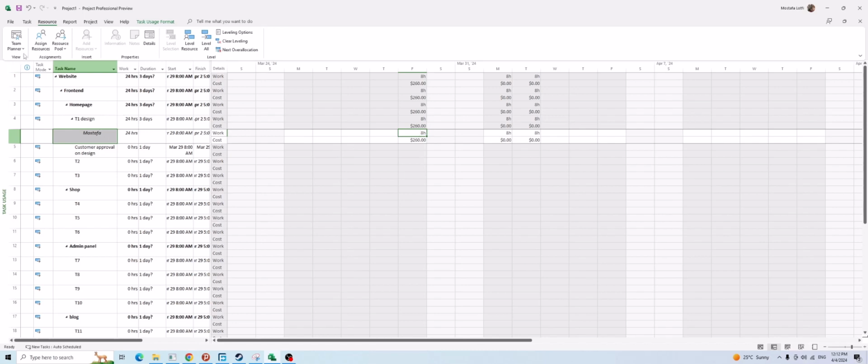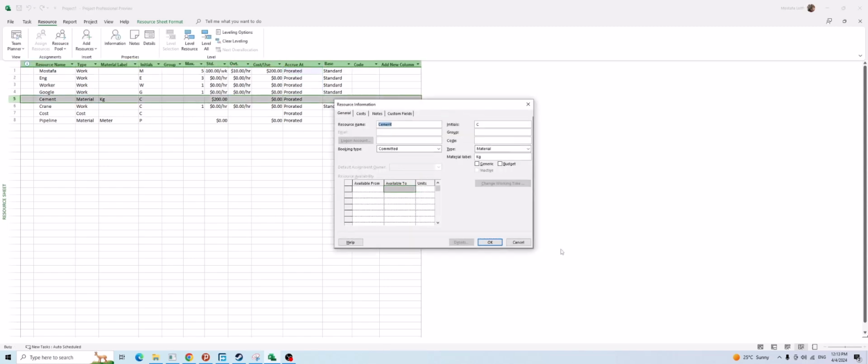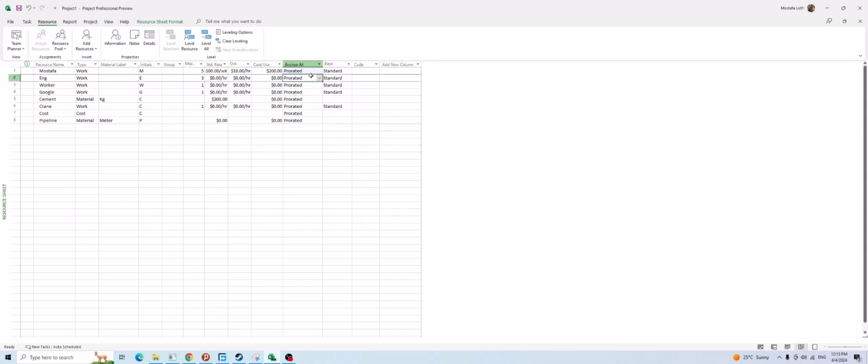It is very important when you want to have cost planning and when you discuss the budgeting of the project, because it is telling you at what time how much money you need. We will discuss more about this point during the budgeting, and you will see how important it is. But for now, by default, inside of Microsoft Project, the value is prorated, and if you need, you can change it.